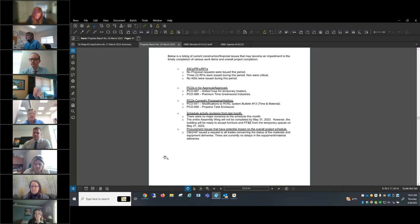Thanks. Quick question for Amy. Where are we on the furniture? Any hiccups, anything slowed down? No, on the contrary, some of the vendors were. We just informed the vendors this week that there was a delay and that we would be looking for their installation on June 15th and 16th or anytime thereafter. They were planning for a May. So we got a little pushback on that, but they have the furniture, they're ready to install. They have to shift around their schedules a bit.